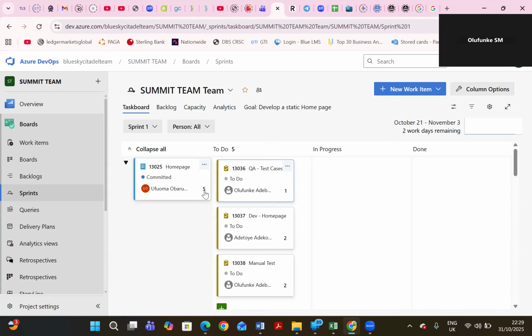And then you're equating that to the 6 hours per day that they have. So if somebody puts a 12 on their task, that person is invariably telling you it's going to take me 2 days, because remember, 6 hours is per day. It's going to take me 2 days to get this done. Okay, so you want to put those there.